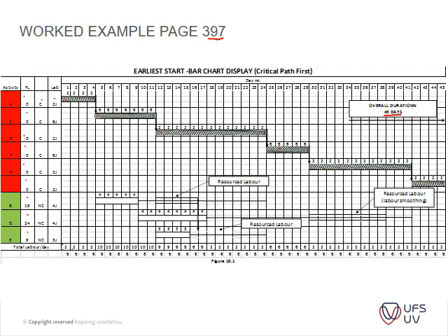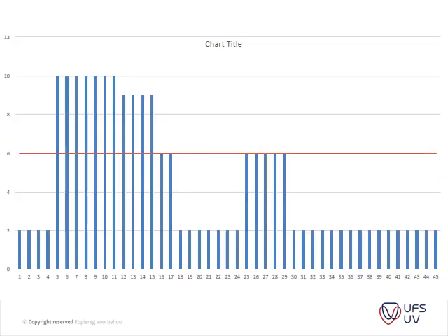From this table, you draw up a histogram, which is shown in figure 18.2, which indicates your peak amount. It's very easy. You can see in your histogram the amount of laborers that you need. You start out with only 2, and then on day 5 it peaks at 10, 7, and so forth.